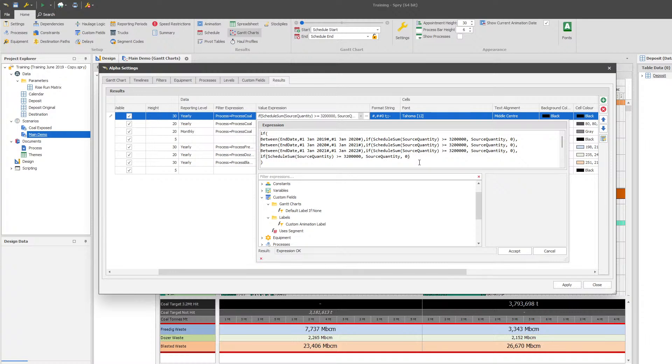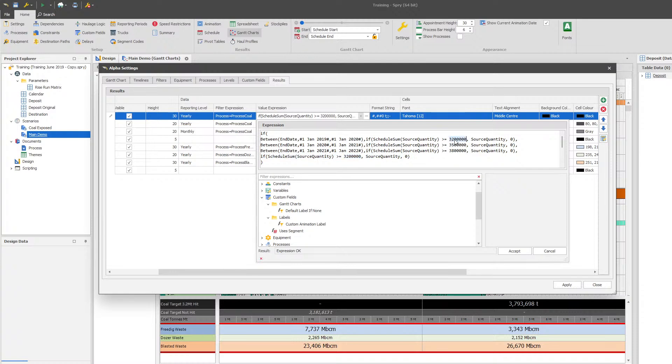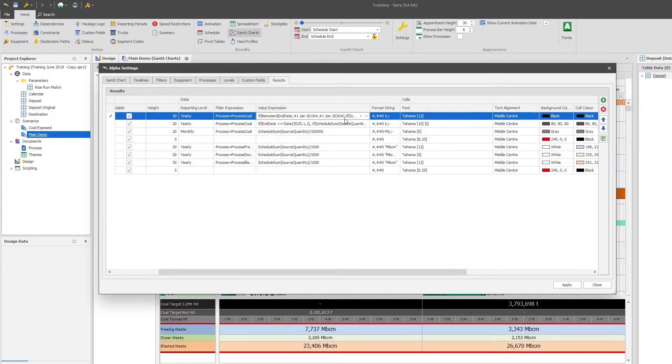We're making use of the flexibility here but there's not necessarily a neat way to track or to link this to a calendar or to link this to something else. You have to manage this manually. But now what we've got basically is an if statement here with a condition and then the value of true, and then another condition, value of true. And then with any nested if statement like this, or with any multi-statement if statement, you have the final one. So basically if none of these conditions get met, then you have like a final target and you may not want a target - you can put anything you like in there. So this one just says for 2019 it's 3.2, 2020 it's 3.5, 2021 it's 3.8, and we make that slight change.